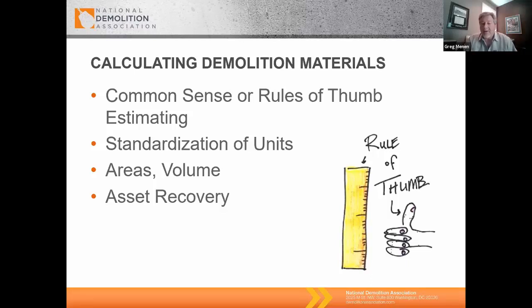We talk about standardization of units and understanding materials, and making sure that if you're going to landfill, is it based on load? Is it based on cubic yards? Is it based on the weight and the tonnage? We calculate out the areas and volumes and talk about those. And then probably one of the biggest ones is obviously asset recovery and trying to figure that portion out, which we all struggle with.